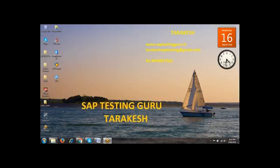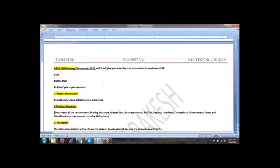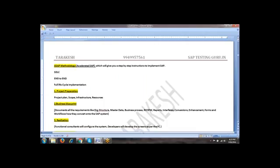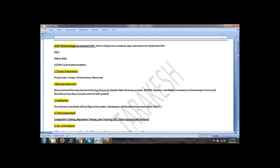What we are discussing is ASAP methodology, which will give you step-by-step instructions to implement an SAP project. Mainly there are five phases in ASAP methodology. What are those five phases? The project preparation, business blueprint, realization, final preparation, and go-live and support.